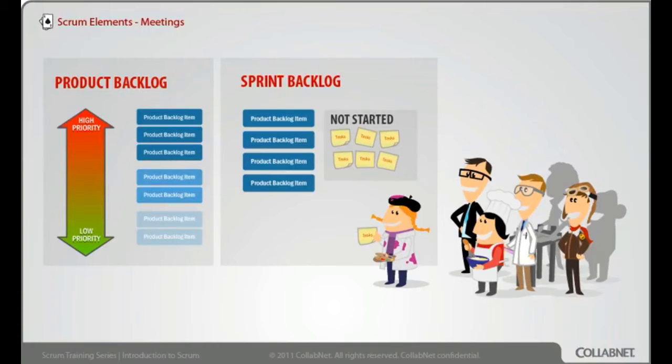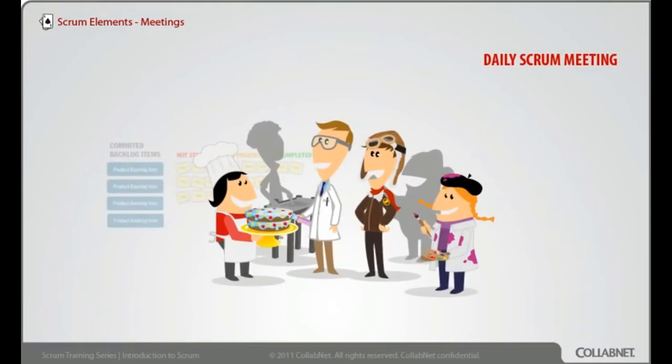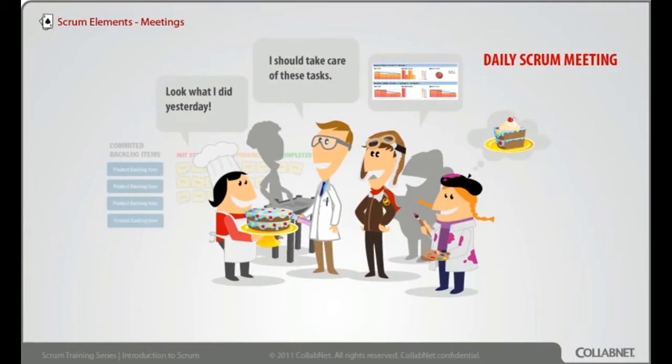They plan one sprint. During sprint execution, the team meets once per day for a 15-minute stand-up or daily Scrum. If we're collaborating, we're meeting all the time, of course, but this one official meeting is defined where we stand up and report to each other. We report to each other, not to the Scrum Master, not to the product owner, not to any kind of boss, but to the team. I report to the 6 other people that are my team members.